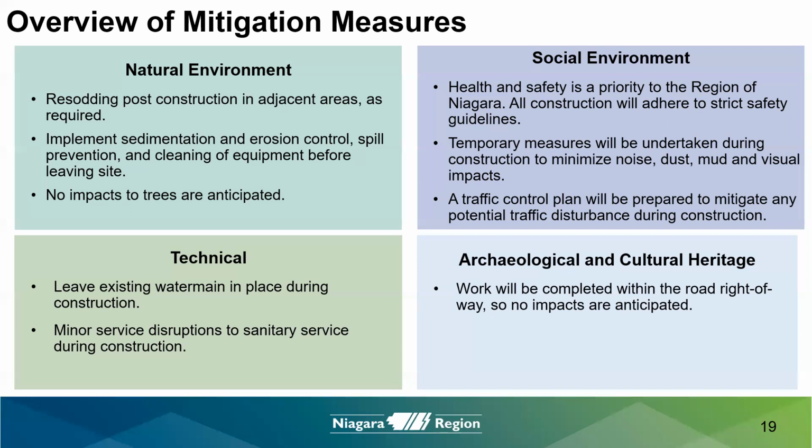A traffic control plan will also be prepared to mitigate any potential traffic disturbances during construction. Archaeological and cultural heritage. All work will be completed within the right-of-way. So there are no anticipated impacts to archaeological or cultural heritage for this project.